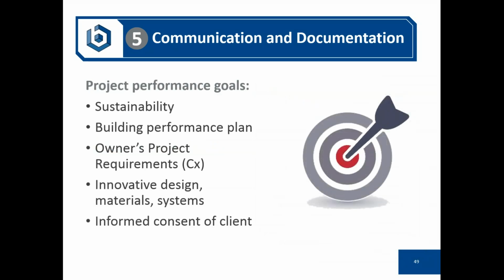Very, very important as client expectations for project performance have increased, particularly within the last 10 to 15 years, as sustainability has become an important component of many projects. What kind of expectations are they going to have for the performance from an energy perspective, from operations and maintenance? If you have a project that is going to be commissioned, if it's LEED Gold or above or otherwise, establish owner's project requirements for technical issues and energy performance, mechanical, electrical.